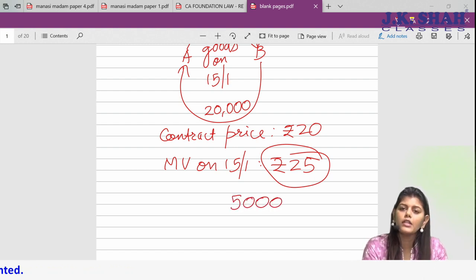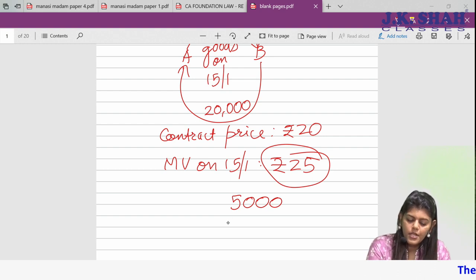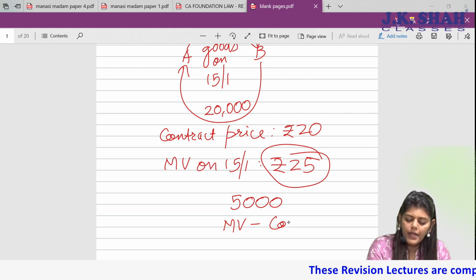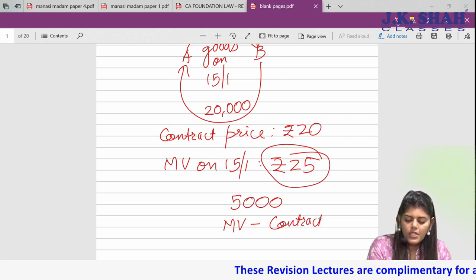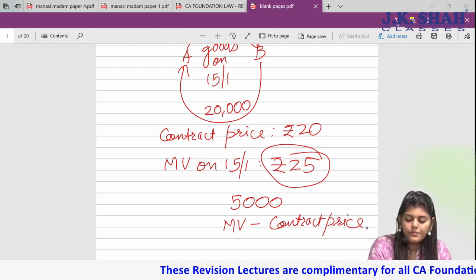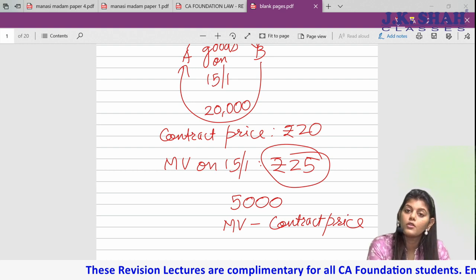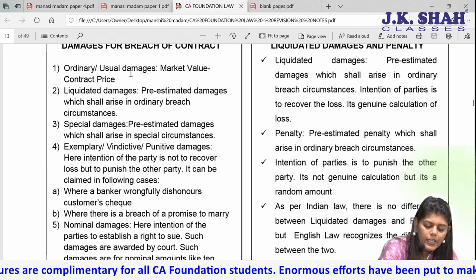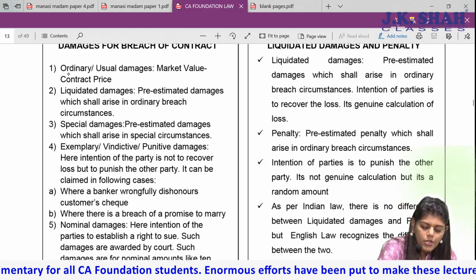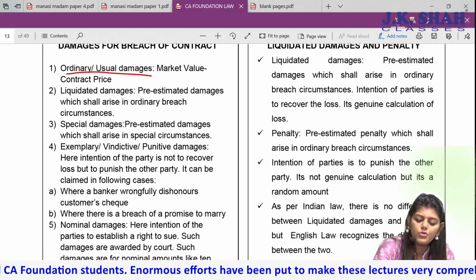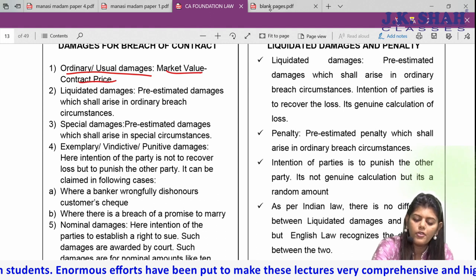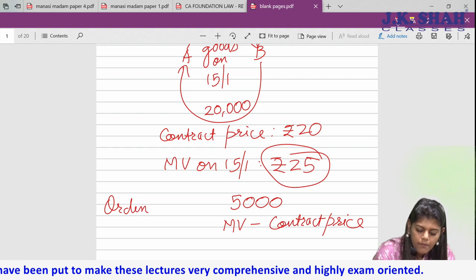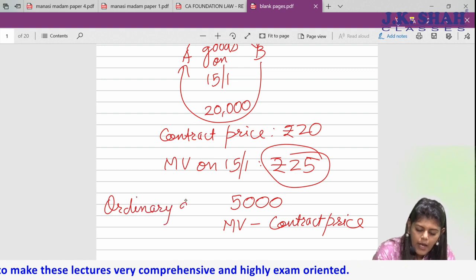How are these damages calculated? You applied the formula: market value minus contract price — that is 25,000 minus 20,000. What you just did is ordinary or usual damages. This is nothing but ordinary damages.